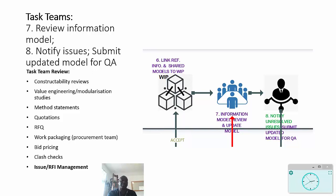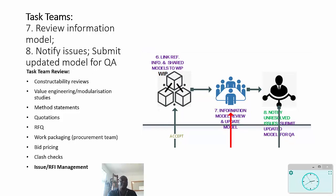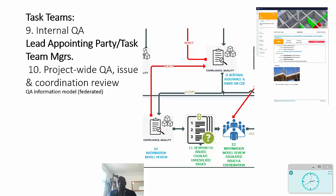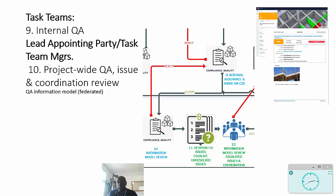The task team themselves need to do an internal QA of that information before it's going to be distributed and shared back to the lead appointed party. The purpose of the lead appointed party is to bring together all that information, which we call the information model - this of course is federated - and then to do a project-wide QA and to do issue management and coordination review.